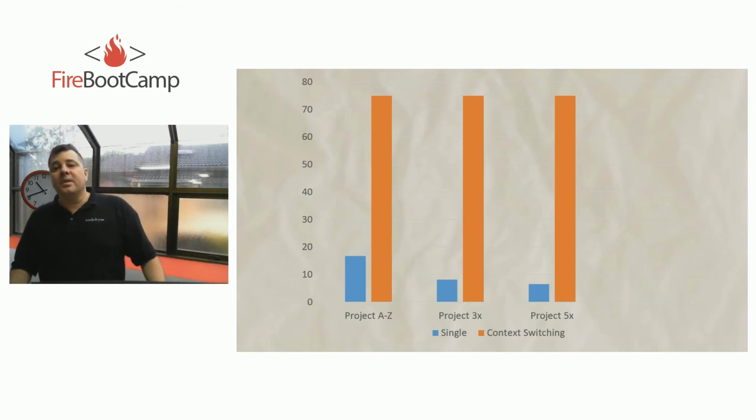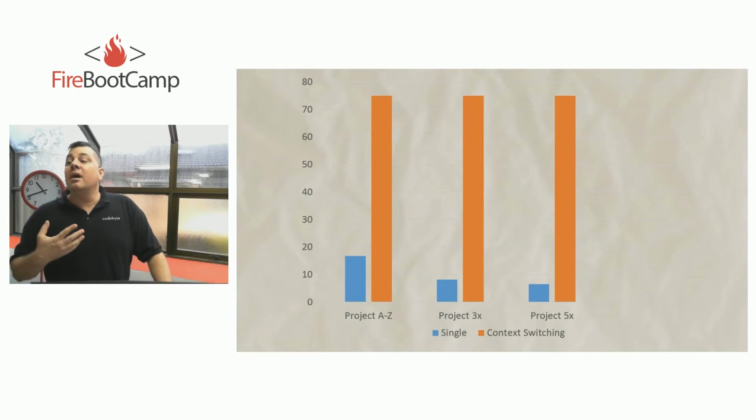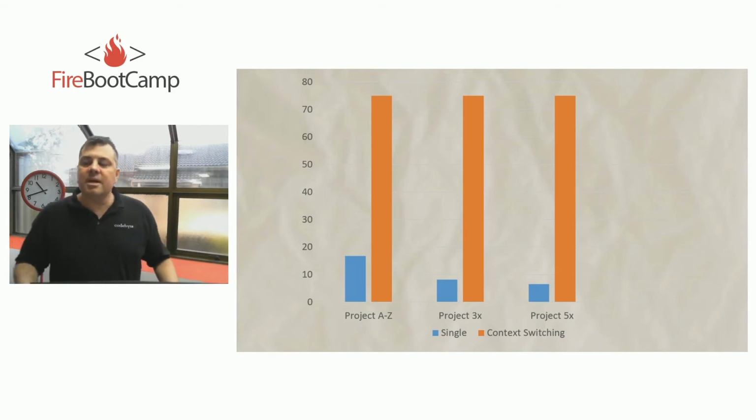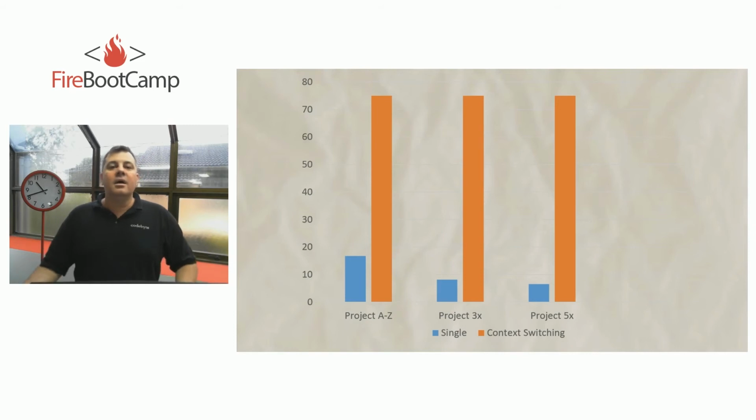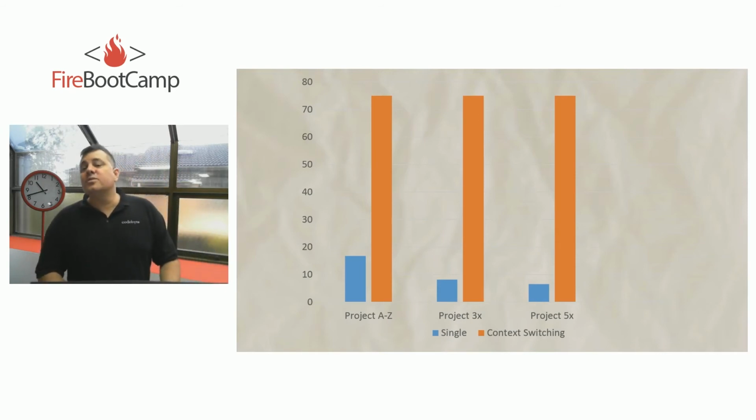So seeing this problem, we said, okay, what can we do to prevent this? Because we need to be more efficient. This is hurting us, especially in projects where you need to deliver. Your time is fixed. Your budget is fixed. You cannot have context switching cripple you like this all the time. So we introduced this thing called WIP limits. WIP means work in process limits, and that stands for limiting the number of things you're working on at any time.